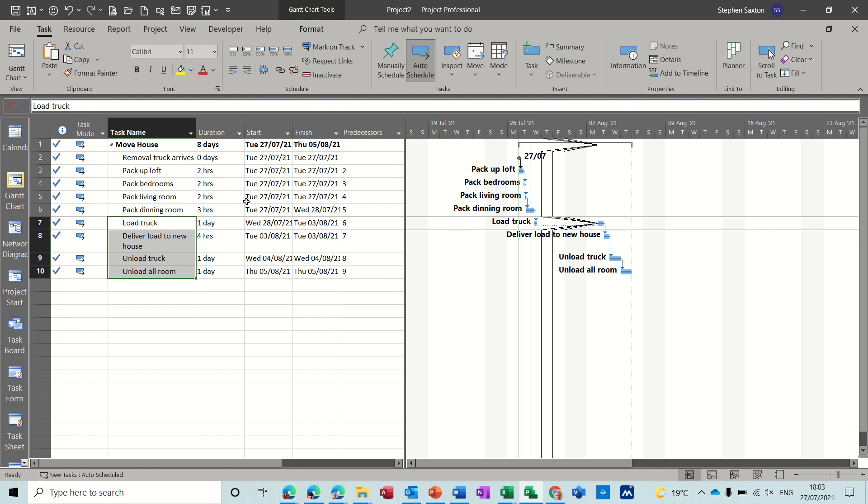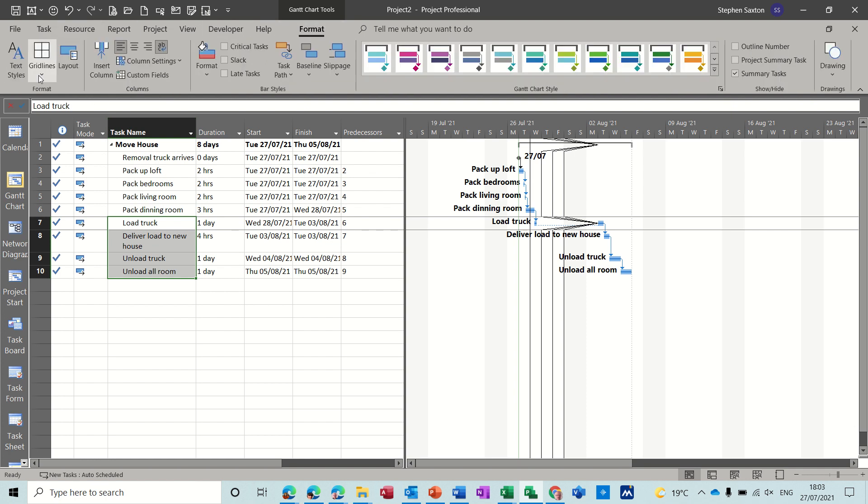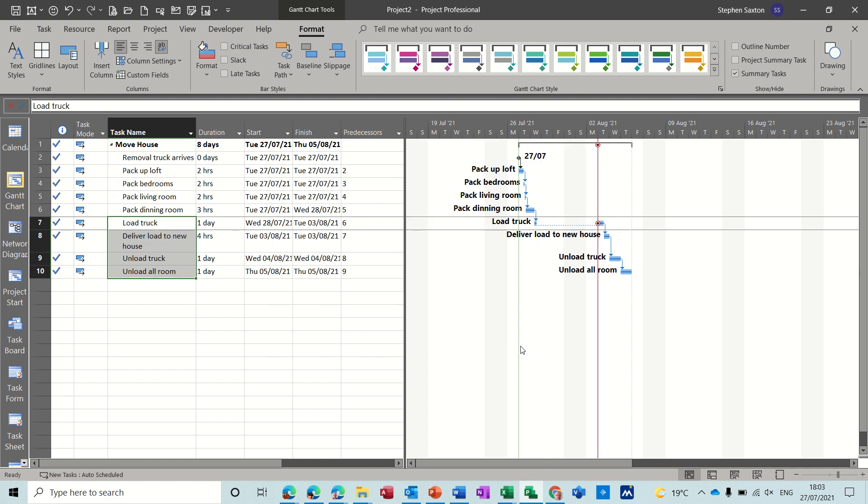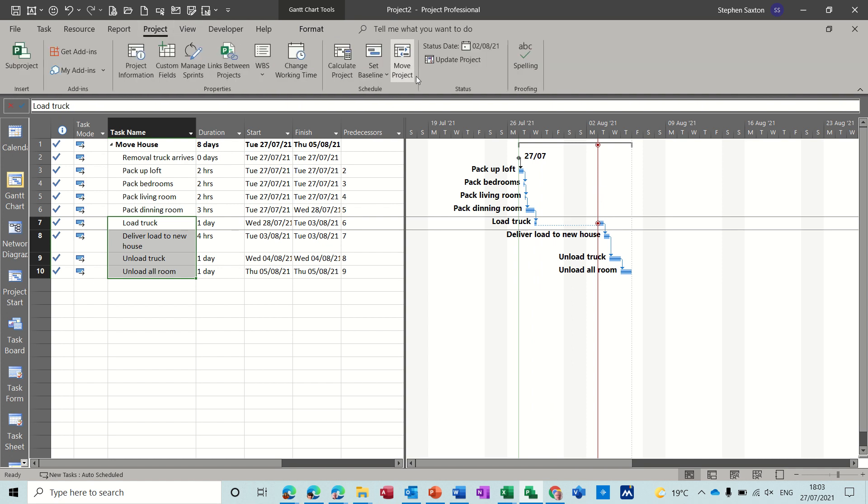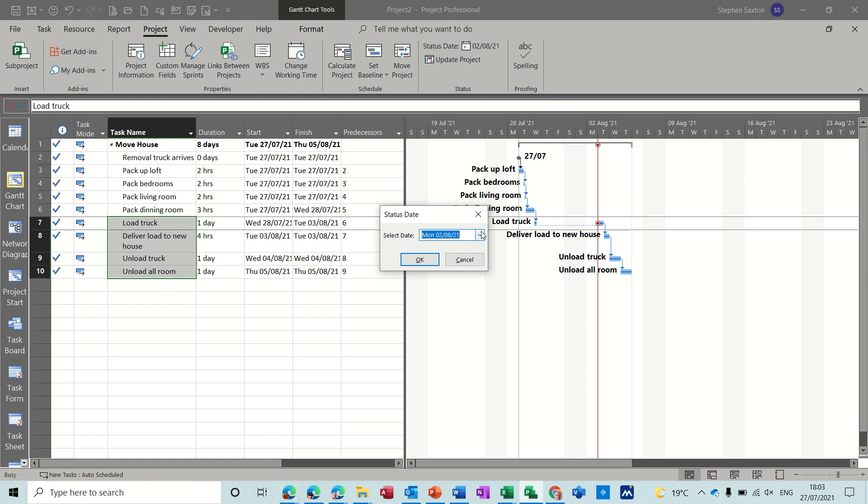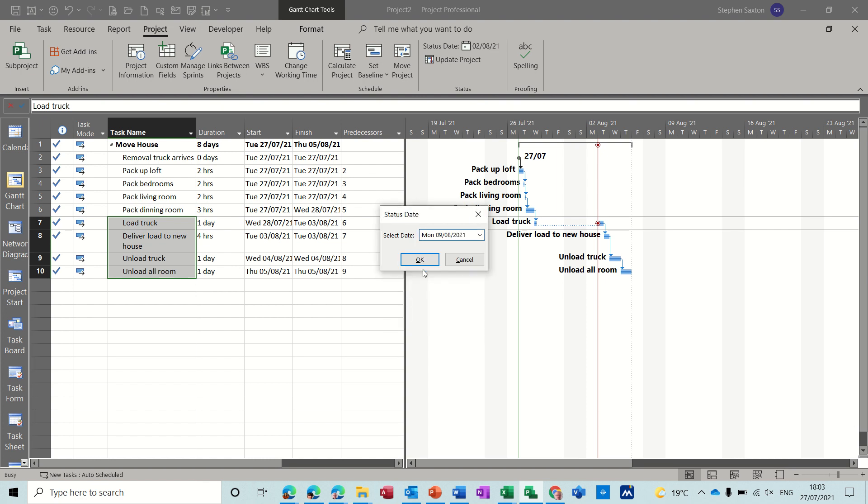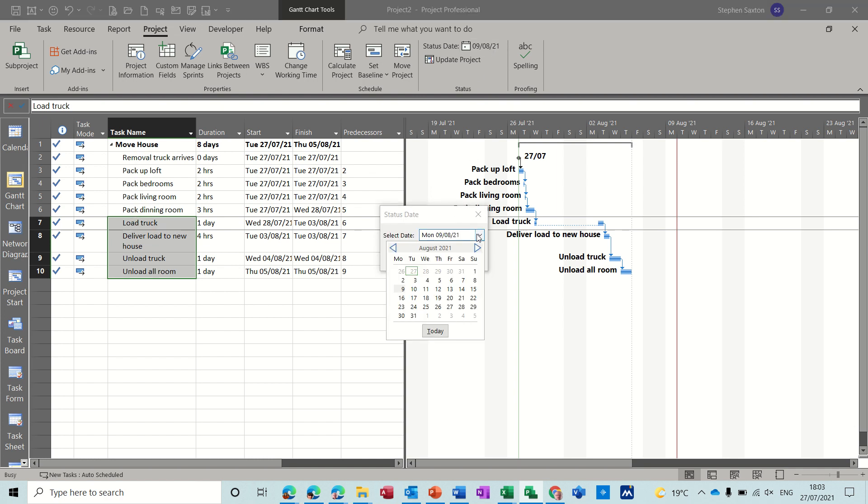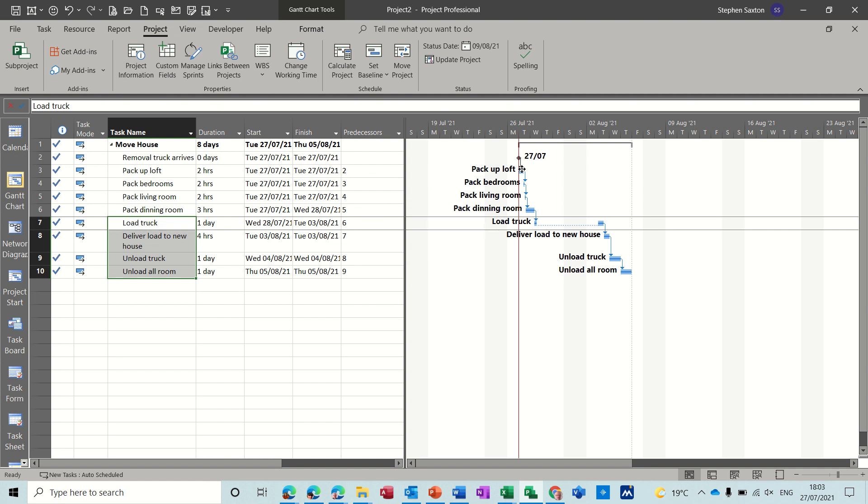Now if I set the status bar to a particular day, go back to format gridlines progress, so take that off daily status date back to that one and click OK, you've got a straight line because everything that was due to be completed there has been completed by that date. And if I go back to project and change that to a week ahead of that, so I'll go to the ninth, say OK, that's a straight line because nothing that got on that date is outstanding. If I come back closer in so if I go back second 26, OK that's Saturday, that's a straight line also. So if it's a straight line you are a happy teddy bear and you're liking that.